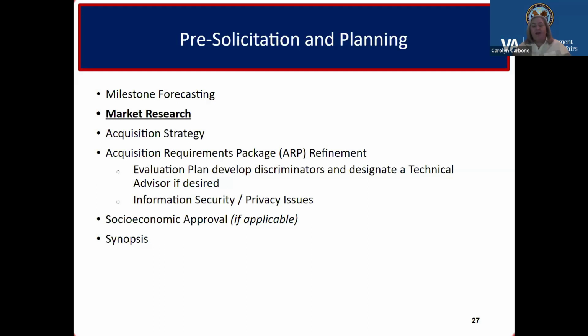legislation, known as Kingdomware, the Vets First contracting program, where we're required to set aside actions if we have service-disabled veteran-owned businesses or veteran-owned small businesses that can do the work. So you may or may not within your agency have a level of socioeconomic approval, but I left it on there just in case it was applicable to you.